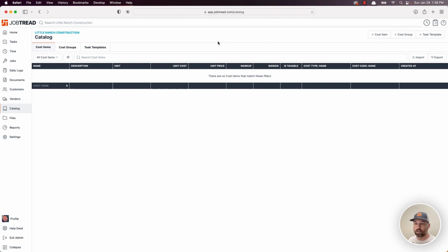The second thing is going to be the level of specificity. I work with some individuals that want to do one line. I'm going to build your pool, $90,000, and that's it. Clearly, you'll lose a lot of detail with that, and we really wouldn't recommend that, because you have a cost breakdown that you can enter into the system, and that will allow you to track your cost overruns and underruns, and then understand if you're on track or not, and of course course correct over time as well, which is really the goal.